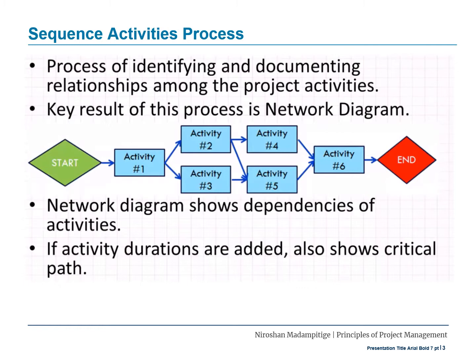Every activity except the first one and the last should be connected to at least one predecessor and at least one successor activity with an appropriate logical relationship. Logical relationships should be designed to create a realistic project schedule. It may be necessary to use lead or lag time between the activities to support a realistic and achievable project schedule.